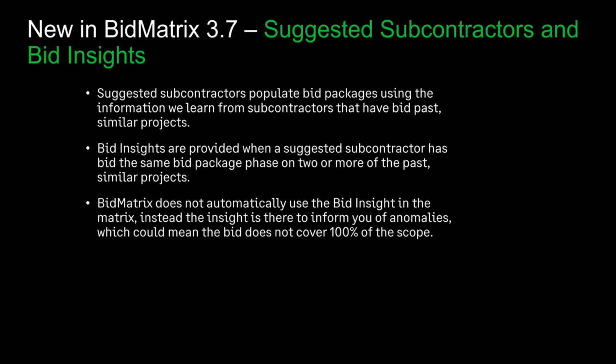A couple of reminders. Suggested subcontractors populate bid packages using the information we learn from subcontractors that have bid past similar projects. Bid insights, the actual insight into the bids that we are likely to be receiving from subcontractors, are provided when a suggested subcontractor has bid the same bid package phase on 2 or more of the past similar projects.